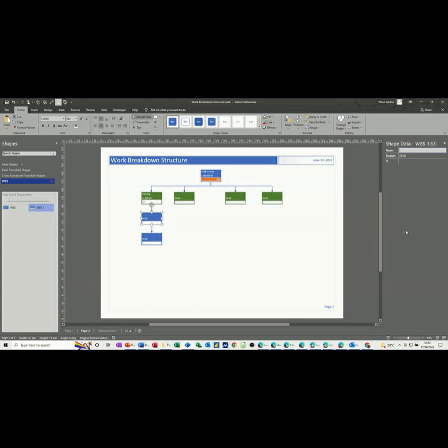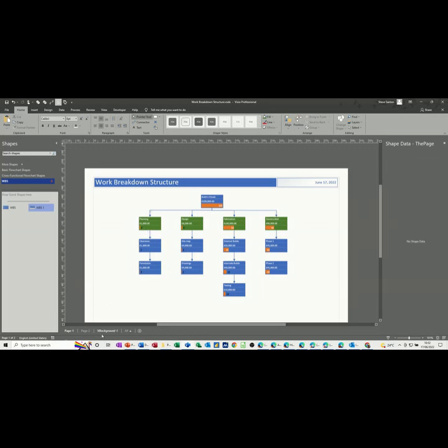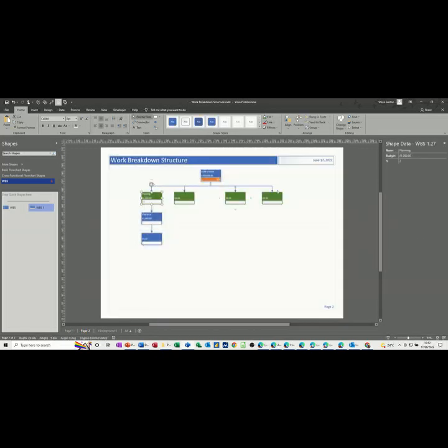So this was planning, so clearance, and the cost, the budget has to be adding up, these two have to add up to that, so that's going to be 1,000, and I've said that was 2%, that looks a bit low, that's 5%, okay, so I'll change that to 5, and then this one can be 3 of that 5, and the next one down can be 2 of that 5, and again the budget would be 1,000, like so.